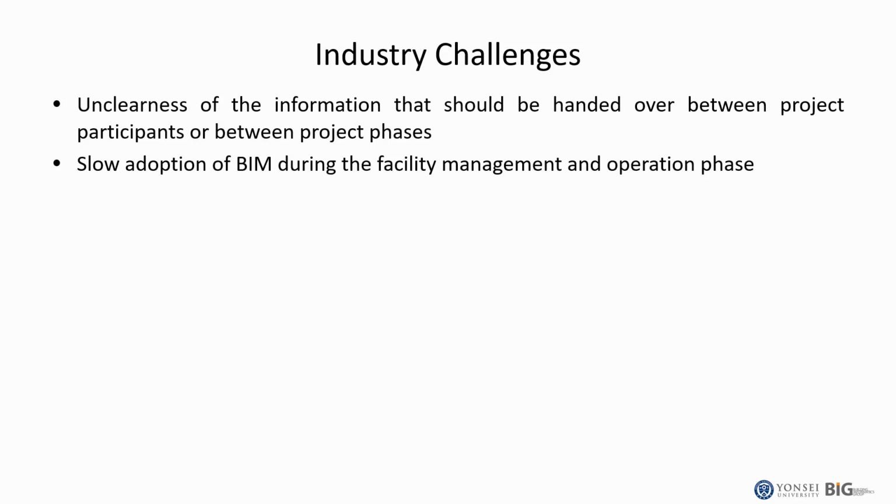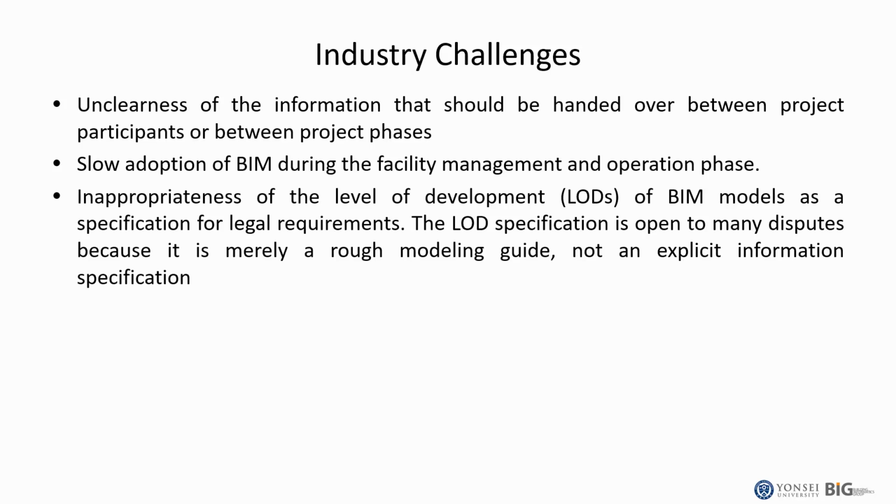Currently, COBie, Construction Operations Building Information Exchange, is the most commonly used specification for clients' information requirements at the project handover phase. COBie works for some types of projects, but not all types of projects. To expedite the use of BIM throughout the life cycle of a project, we need a lot more IDMs and MVDs like COBie. We are using LOD as a way of checking the required quality of submitted BIM models. However, LOD is merely a rough modeling guide, not an explicit information requirement specification.